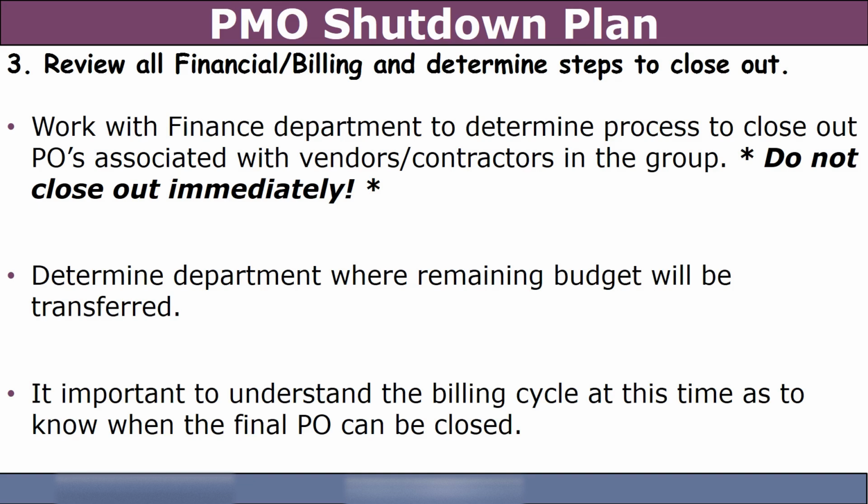Right? Make sure you work with your finance department, transfer any budgets that are remaining to a different department, but understand your billing cycle and make sure the final bill has been processed before you shut down your PMO or your PO, sorry. You wouldn't believe how many people, if the PMO is shutting down, say, okay, that's it, all the POs are canceled. You can't do that.